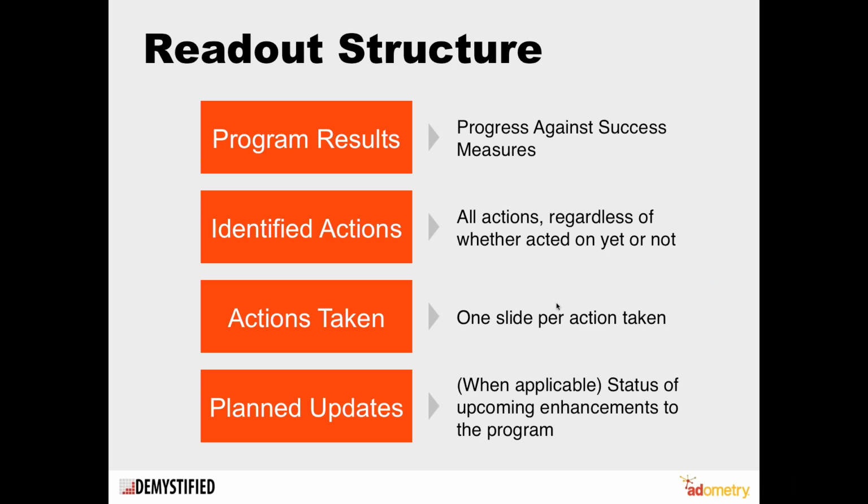The structure that I like to use is always leading with those success measures. The very first tactic we talked about is having clearly defined success measures. So this is one page, one screen that is very objective: these were the measures we established, and this is how we're performing against those. And it's okay if they're not all hitting, they're not all green. It's transparency, it's building trust, and it's really saying, are we delivering what we set out to achieve?